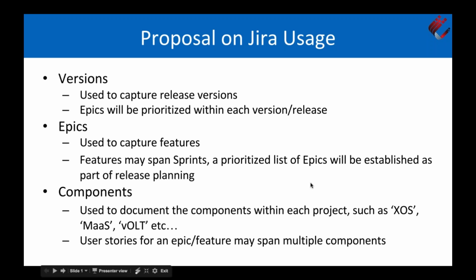In talking with some folks, I think there are questions around what the prioritization is of what we're trying to deliver. Right now we're very component-based. We take each component and do a story based on that. Well, all the stories theoretically tie to something. So the current approach is to start from the top. For each release planning session, focus on identifying the version and then identifying the epics that we'll use as features that we're planning to release with.